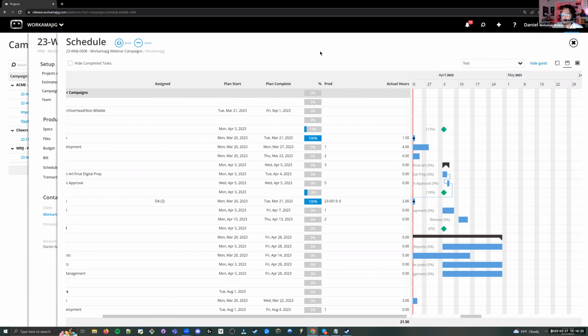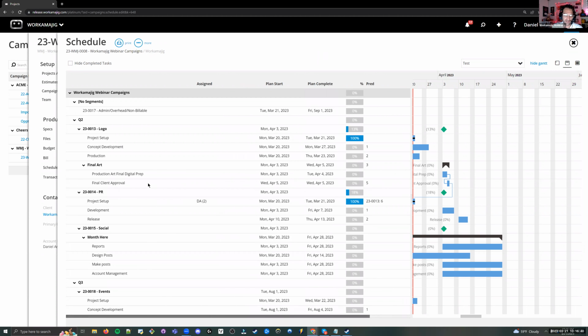So I always try to train users to do this in a way just like this, right? This project ends on this task. Once it's marked as complete, then we start this one. That kind of straightforward piece there. If you start having them go spaghetti back and forth, it can be really difficult to start tracking these things. But I at least wanted to let you know that that was an option.